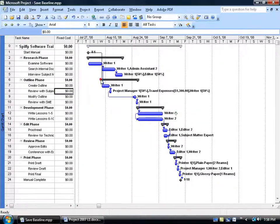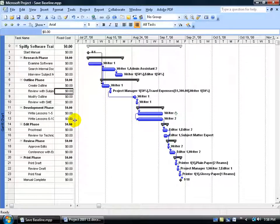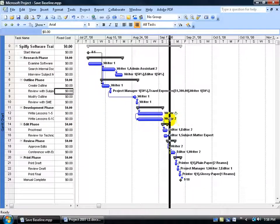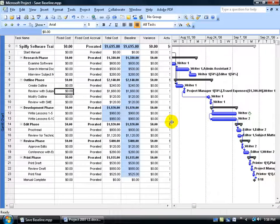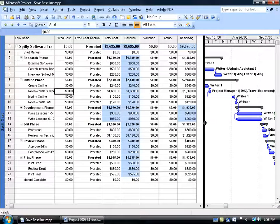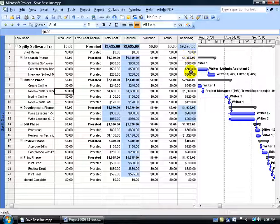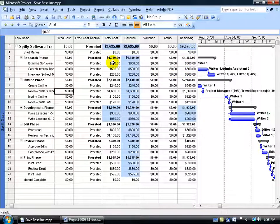I'm going to come over here and select Costs. I still have the Gantt chart here, I'm going to click and drag that divider bar all the way over to the right as far as I can. Then double click really fast to snap it to the last column here and you can see your total cost here per task.